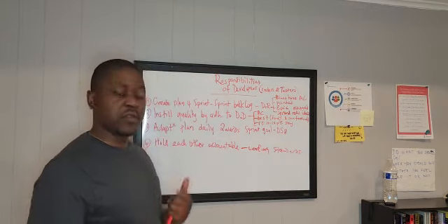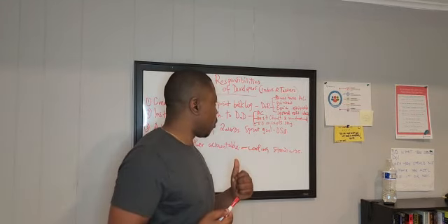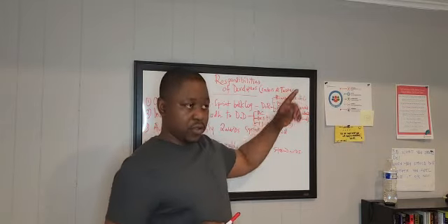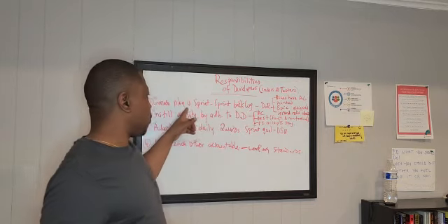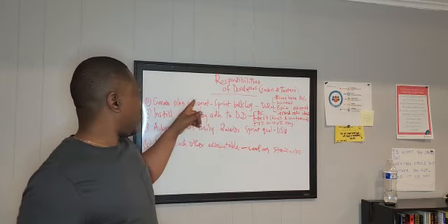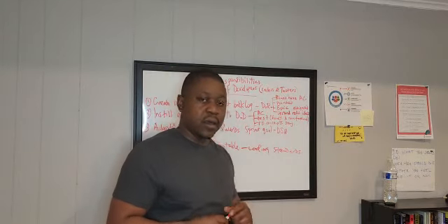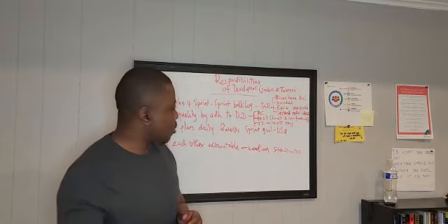Typical aspects of the definition of done include the acceptance criteria, which is the acceptance criteria we talked about when coming up with the plan for the sprint. At the end of writing that code, the acceptance criteria must have been met.